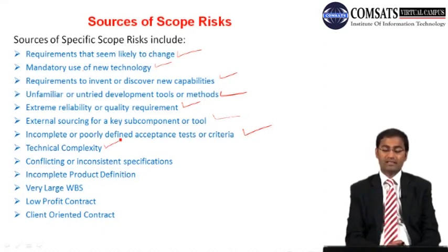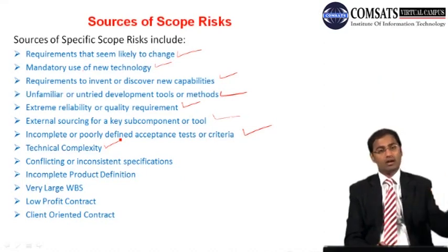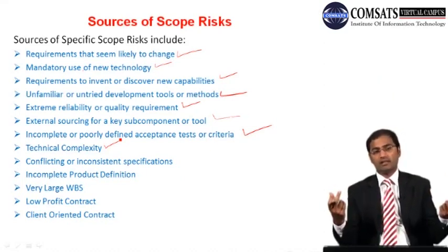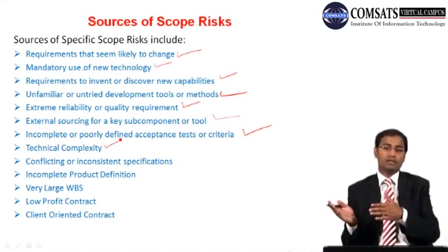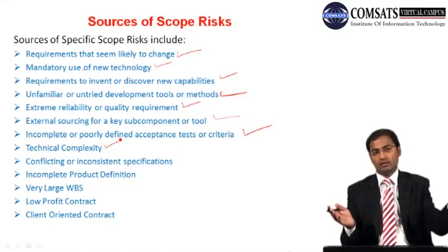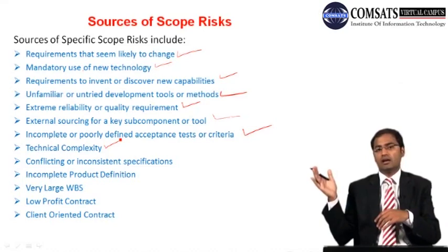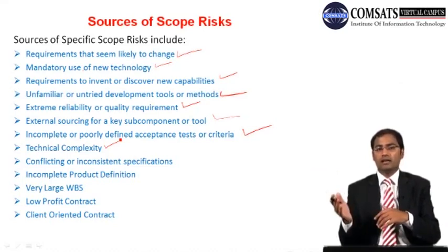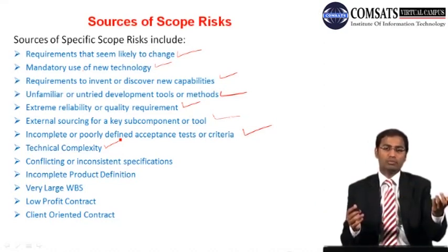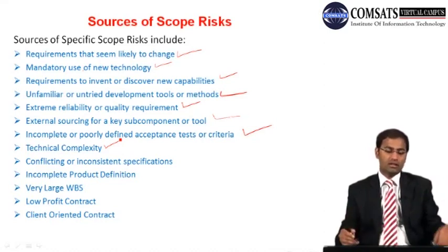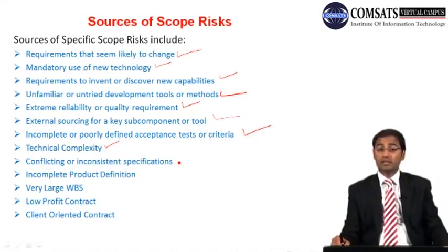Then conflicting or inconsistent specifications: somewhere it reads one thing, and the second time it reads something else. Then the client may be focusing on that, and you are actually bringing the first one. Sir, madam, this is what is written in our specification. Then this gentleman, this lady, is of the opinion, no, we have to stick to that second one. But you have developed your product on specification number 1. So identify such inconsistencies as early as possible.